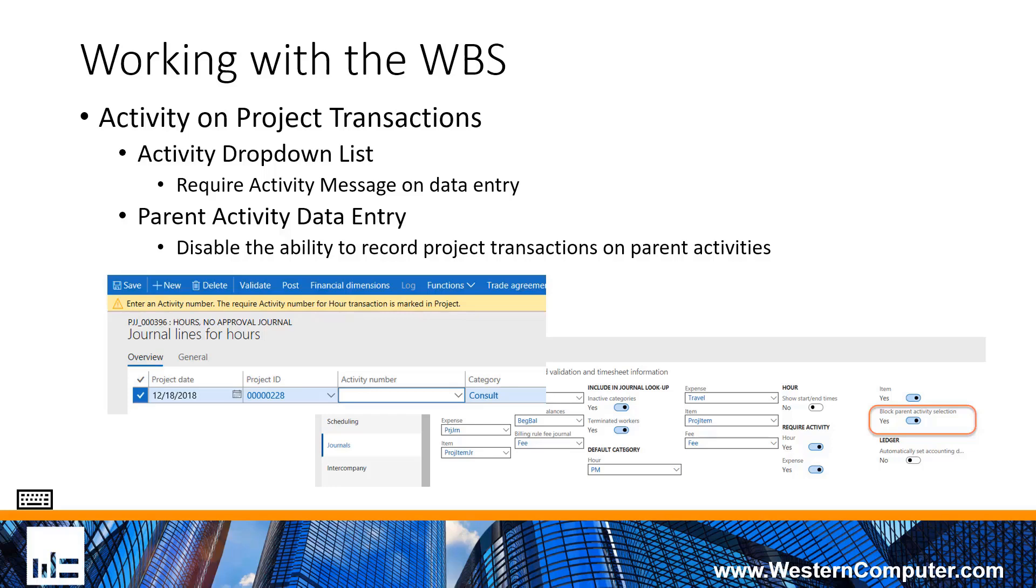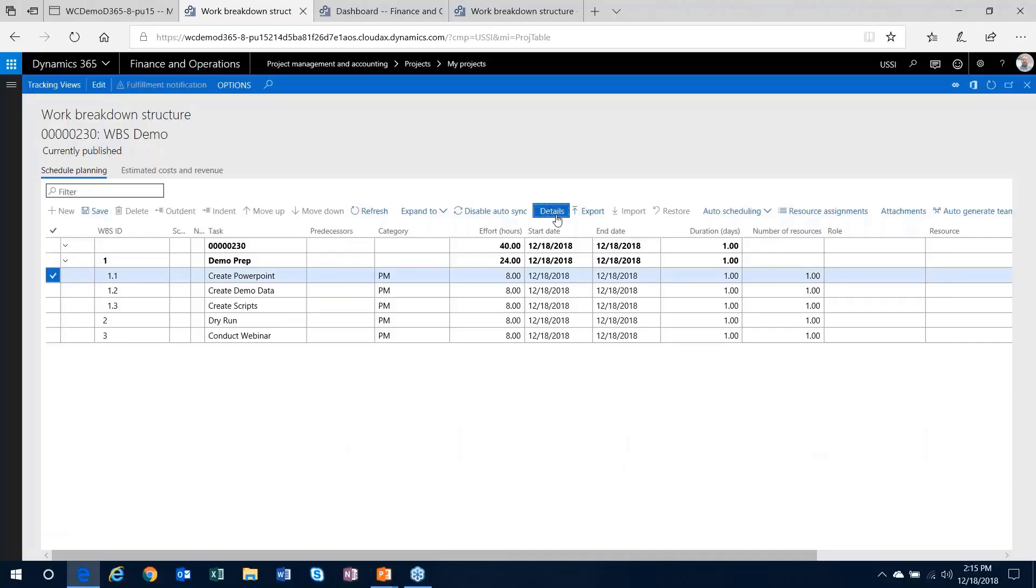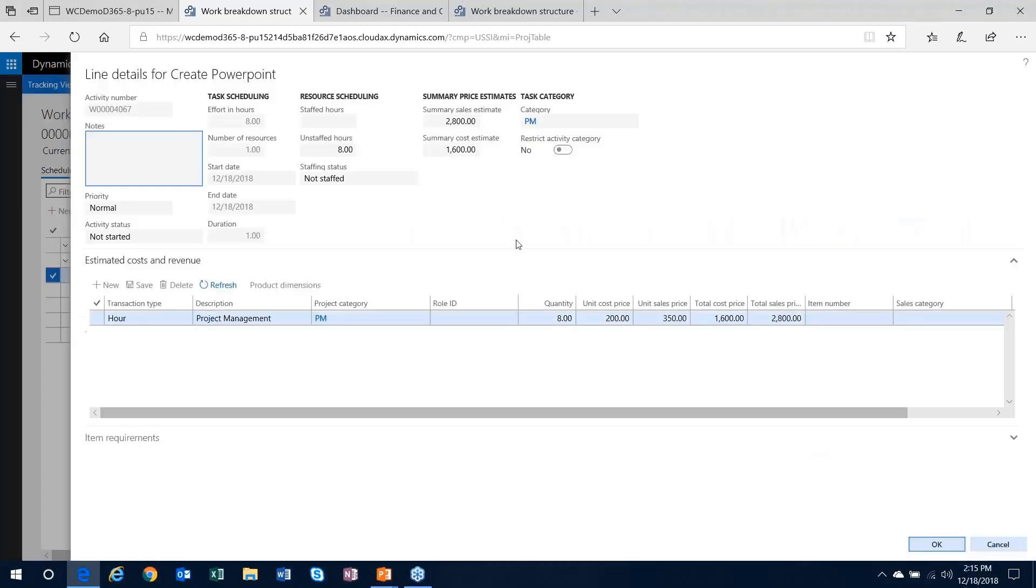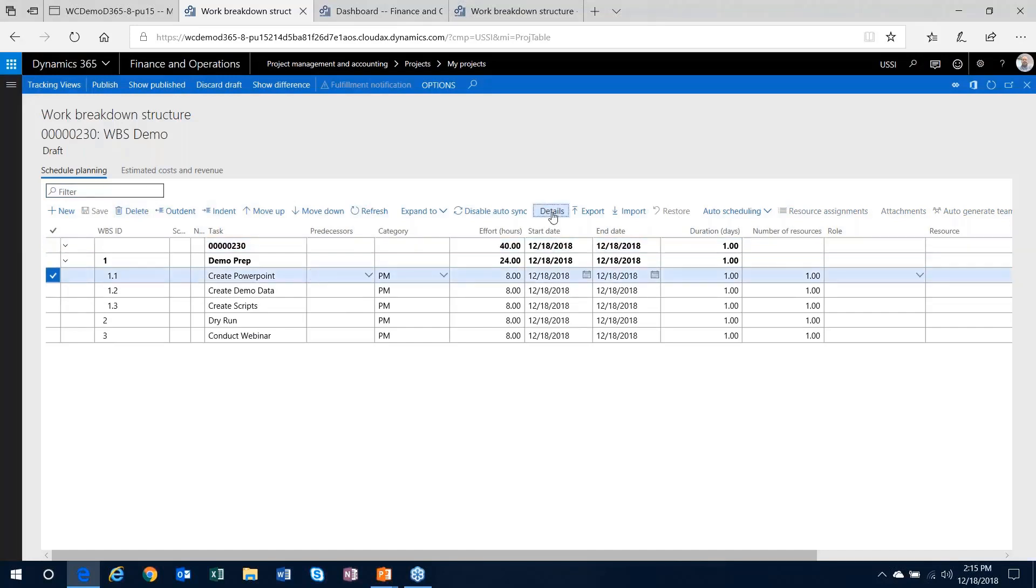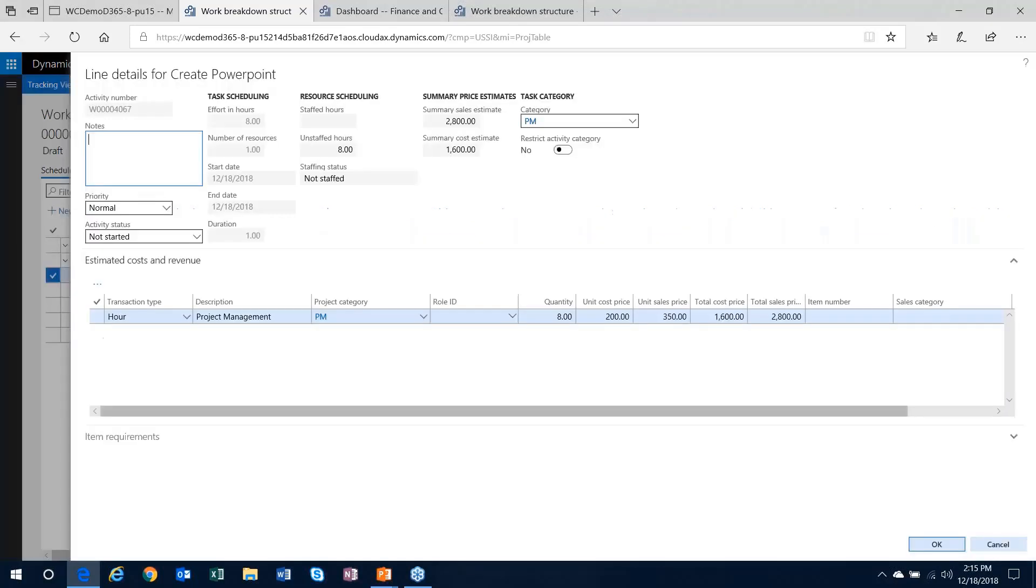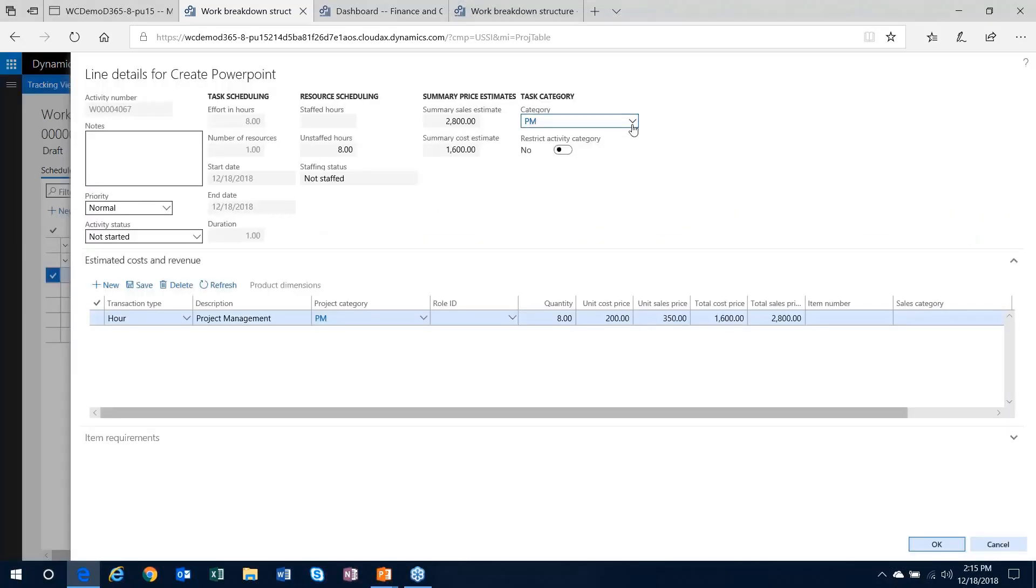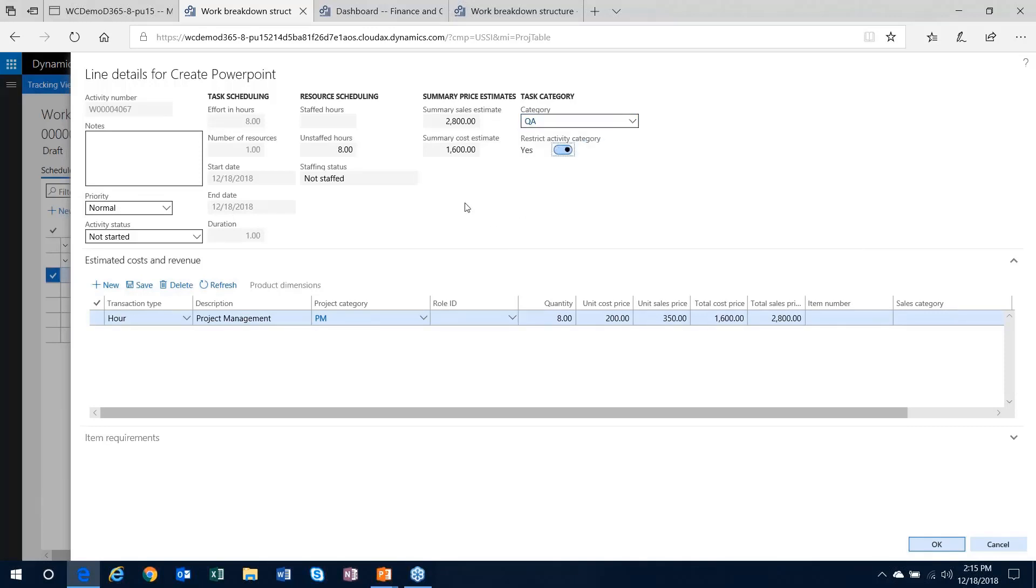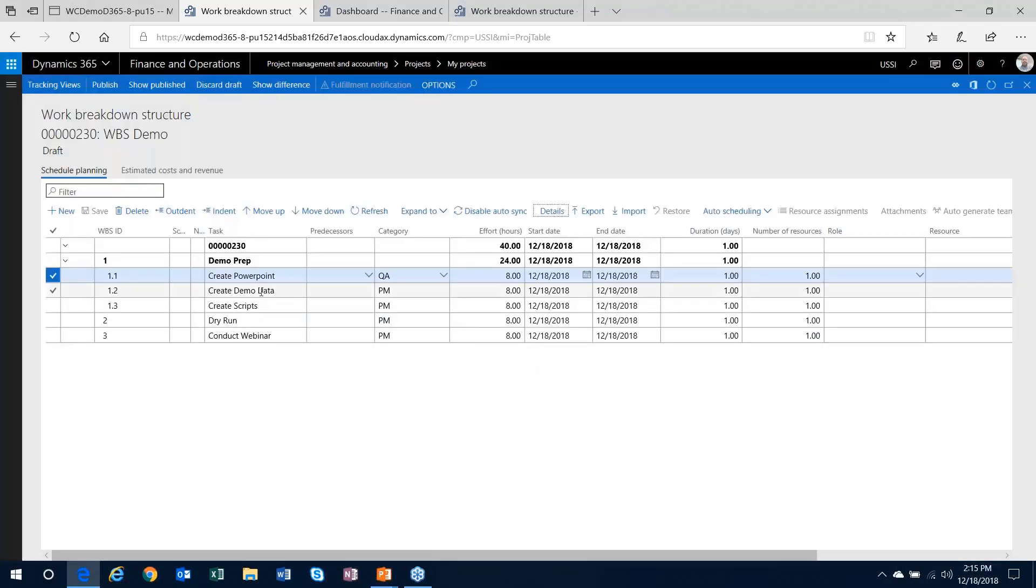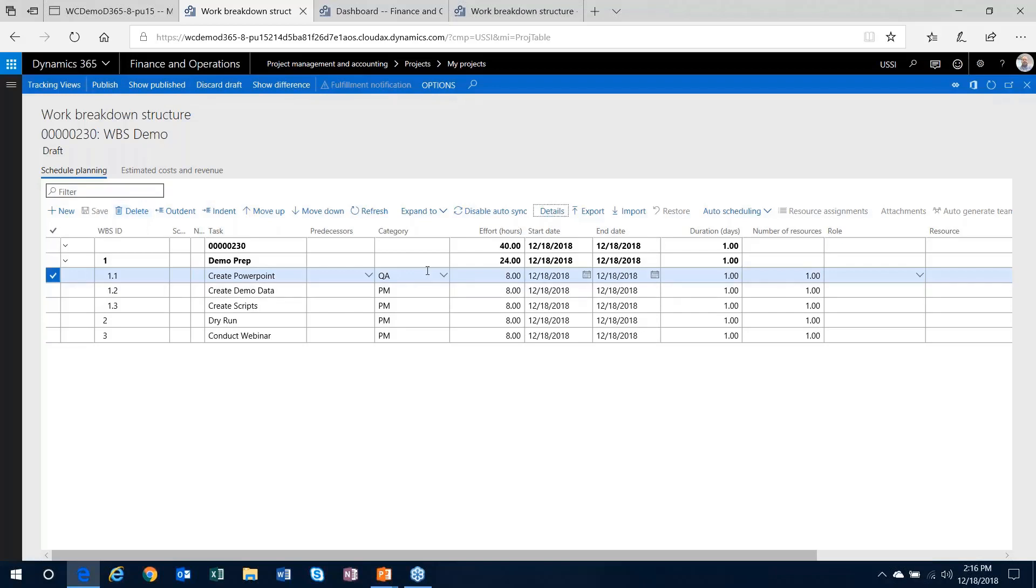When I am on a task, I'll click the Details button, and that's how I'll get to the screen here. Let me edit my work breakdown structure first, and then I'll be able to change that category. I'm going to say this first one, I'll just turn it to QA and I will require it. One thing to know is that in order for any changes that you make to work breakdown structure, you'll have to publish them. What this functionality allows you to do is when I edit the work breakdown structure, it basically puts it into a draft mode for me.